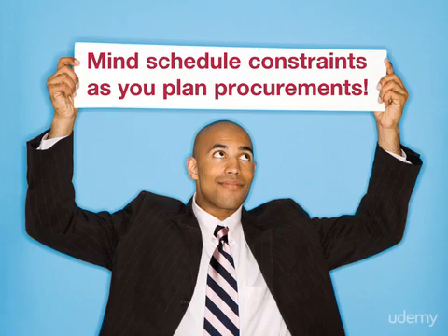For example, if your schedule says that you need those 3,000 screws and bolts completed in 4 weeks, but your in-house capacity allows for a maximum of 2,000 completed by then, well, something has to happen.